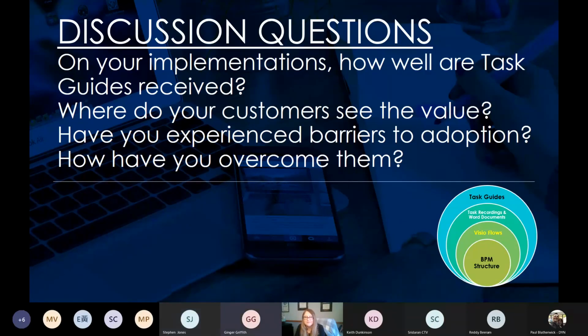I think you made me think of another point. You really have to have buy-in from the customer project manager from the beginning. I've been on a few projects where, if you have buy-in from the customer side and a mandate from the project manager, this is what we're going to do, it seems to flow better throughout the whole team. If you don't have your customer project manager on board, sometimes it's a struggle, like you said. So thank you very much, Stephen.